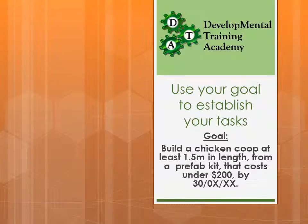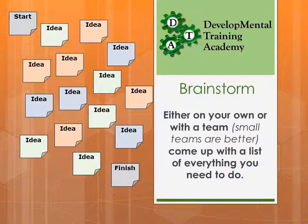The first thing we need to do is use our goal for our project to establish our tasks. We've selected a basic goal here for a very small project. We're going to build a chicken coop which is at least 1.5 meters in length from a prefabricated kit that costs under $200 by a particular date. The first thing we do is brainstorm all the things that we think we need to do to achieve this project.